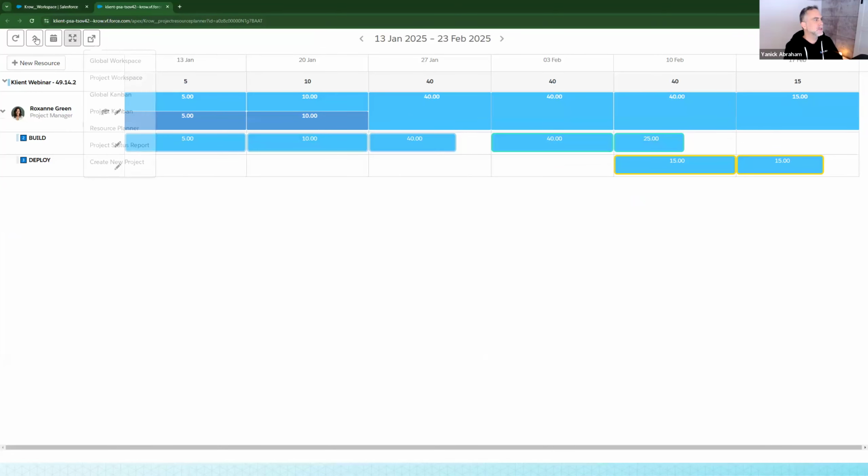This could be something that your team wants to do because now they really want to know, and they can come in here and start scheduling their hours directly here. So that's the concept here of aligning schedule versus log. At this point, we're just flushing the hours, aligning, and we're not doing anything with the remaining hours. In a future version, we're going to prompt you with another question.